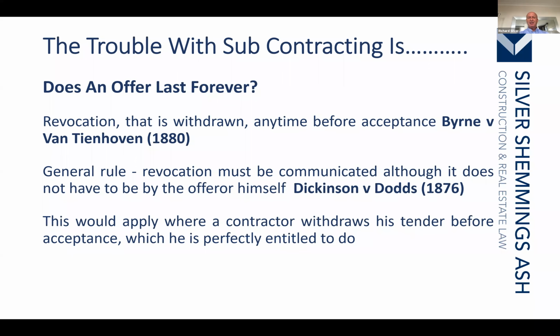And that's when the submitting of the tender is a contract in its own right. So if I ask you to quote for the works, and I ask you to make sure that your tender remains open for 6 weeks, and that I will pay you £1 for doing it, and you then do it, we now have a contract. My initial request was an invitation to tender. By you submitting your tender in accordance with what I requested and me then paying you the £1 creates a contract, and that tender must therefore remain open for the period stated and agreed.